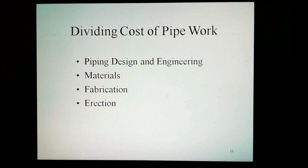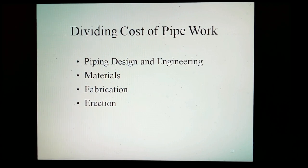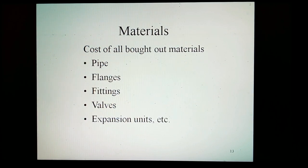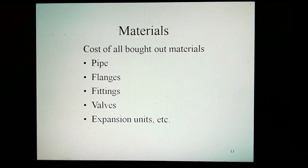Dividing the cost of pipe work. The costs of the process industry pipe work are usually subdivided as follows: pipe design and engineering, materials, fabrication, and erection. Pipe design and engineering covers the cost of design work associated with the pipe work, including layout studies, scheming, analysis, and detailing. Materials covers the cost of all bought-out materials — that is, pipe, flanges, fittings, valves, expansion units, etc.